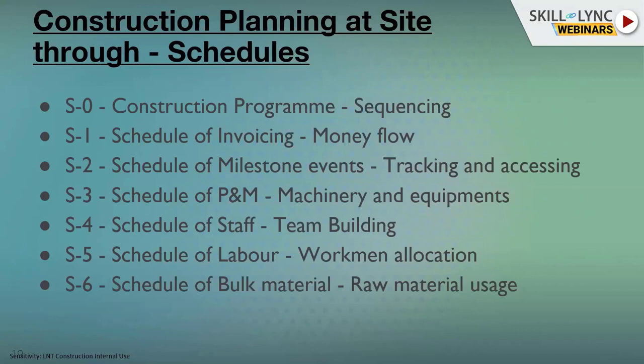Labor is the most vital resource — they are the ones getting the work done. There must be a labor schedule defining at what time how many laborers are required, derived from every sequence of the program. Similarly, there is a material schedule: how much cement, reinforcement, formwork is required — like ingredients in a recipe. The quantity depends on the number of people involved. This is called material planning, all derived from the construction program.